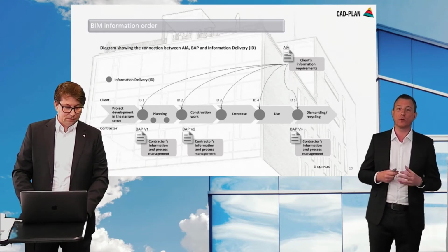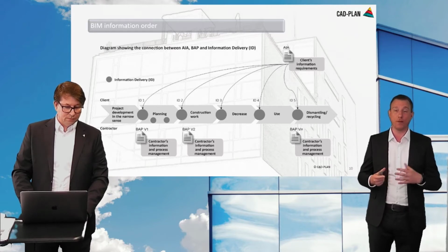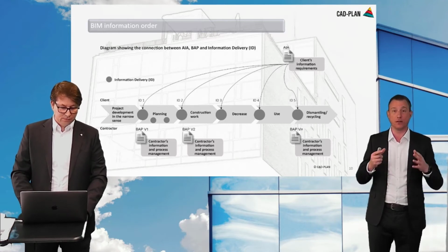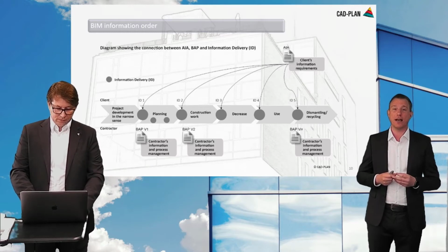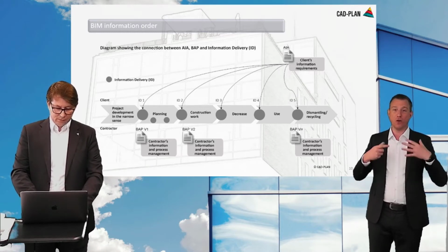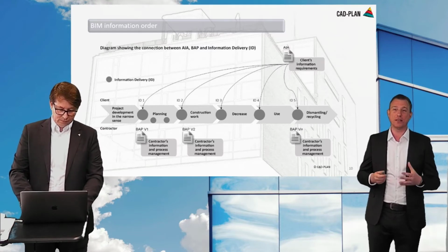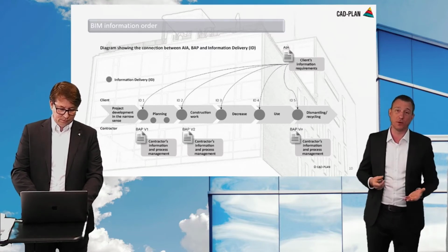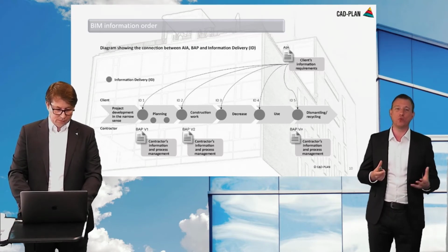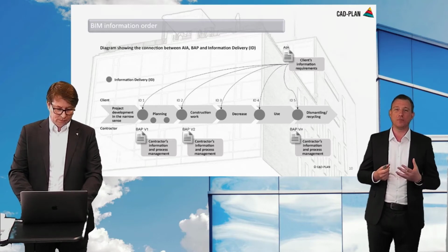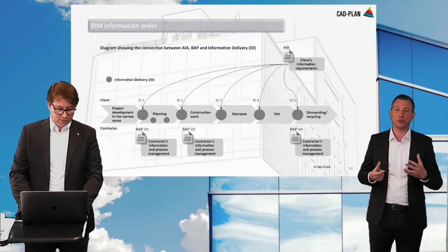In practice, the question often arises when to start with BIM or information management in a project. Here, it is important to recognize that if the client orders BIM for the project, it should be started as early as possible with BIM. It would be a shame to realize at the end of the phases that BIM has been paid but not received.